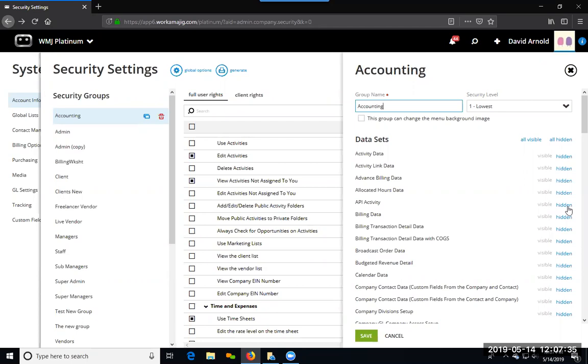Okay, so coming back: amount of open advanced billing by task. Now that's a hard one to do because advanced billing, as you know, is really a top level thing. Even though you may connect it to a particular project, it's not really affected by the project itself per se.